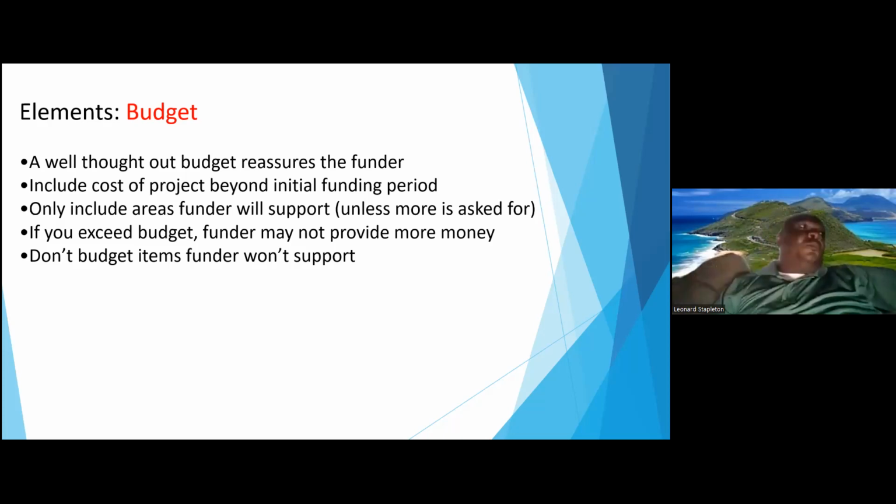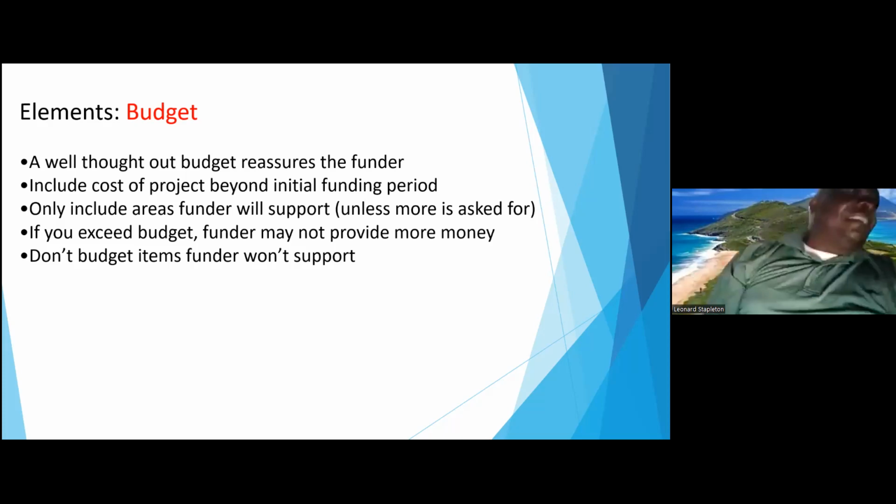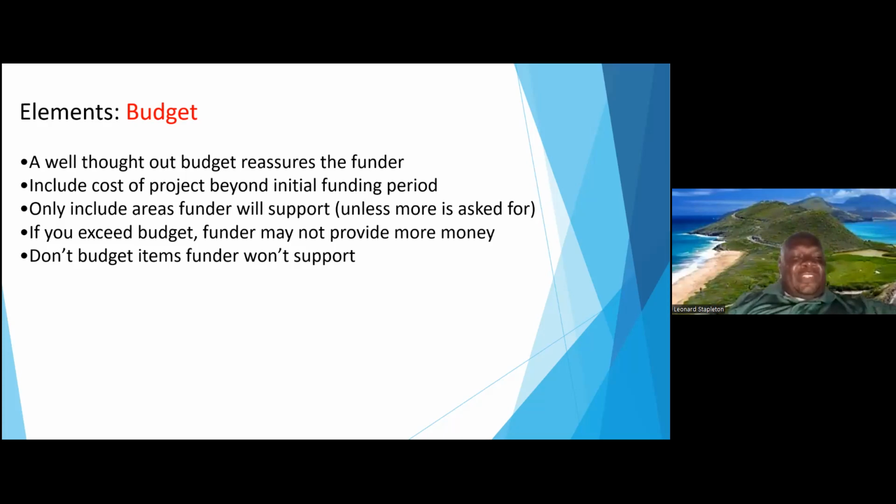Okay? Because sometimes you have to do the full basket approach. It doesn't make sense that you have a $60,000 project and you're waiting for months, maybe years, for a particular funder to give you the full 60,000. There might be aspects of your overall project that small grants can fund. It doesn't mean that you have to put down your entire project. You can do these smaller sections and get funding for them. It's just that some funders don't want to see the overall thing.